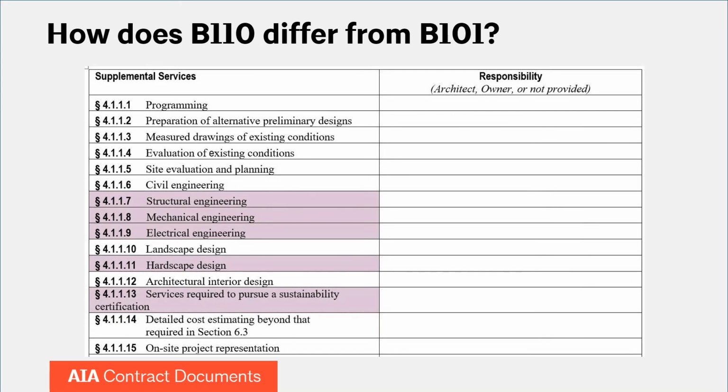Engineering services are supplemental, provided by the owner or architect. Unless listed as a supplemental service, the B110 presumes that mechanical engineering services, for example, will be rendered through a design build process, such as when a contractor lays out the HVAC system. Supplemental services are those services which are beyond those covered in basic services, but which the architect will provide.